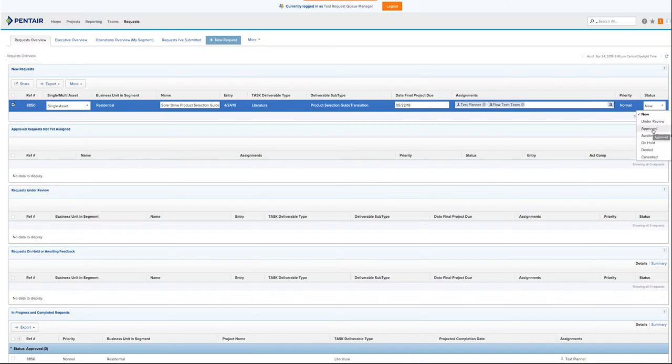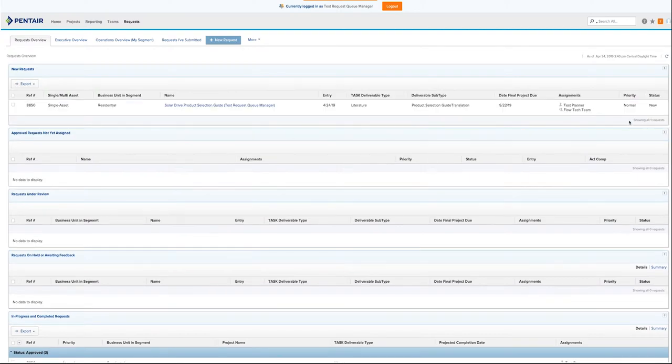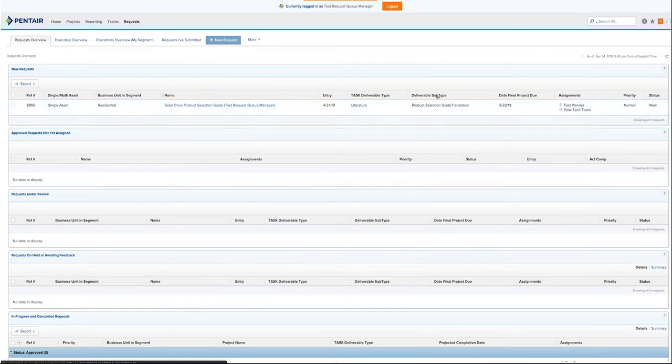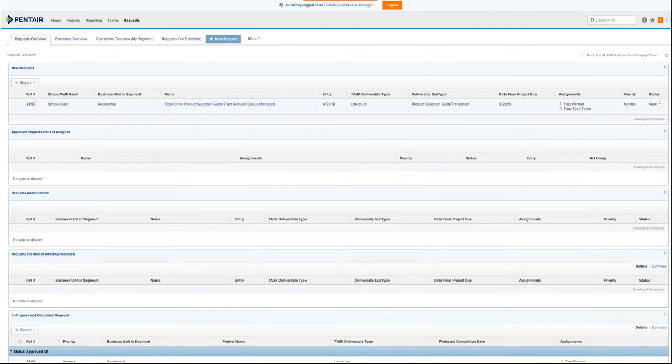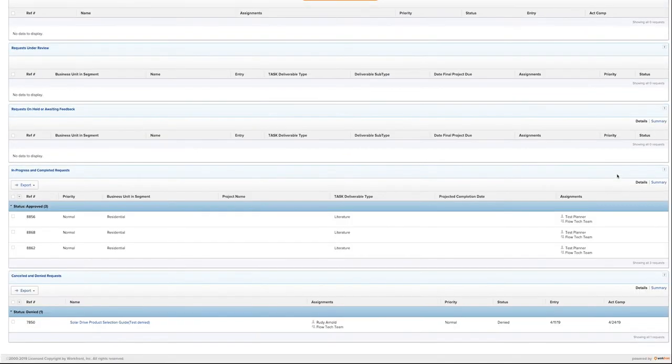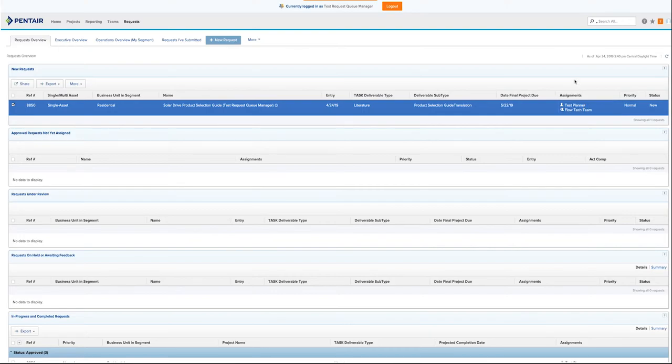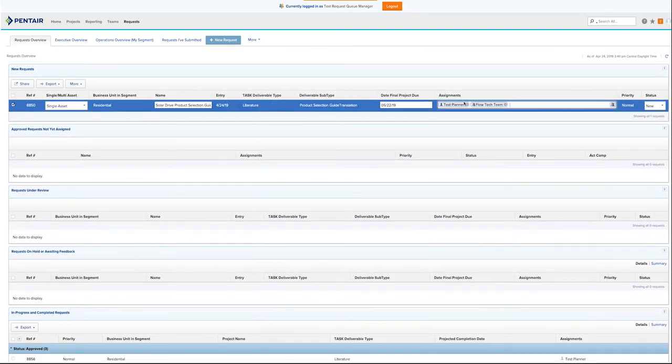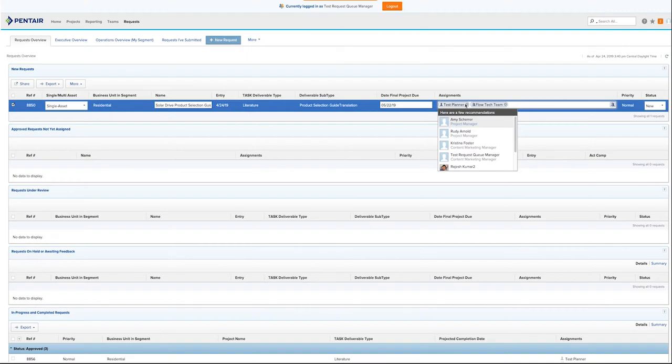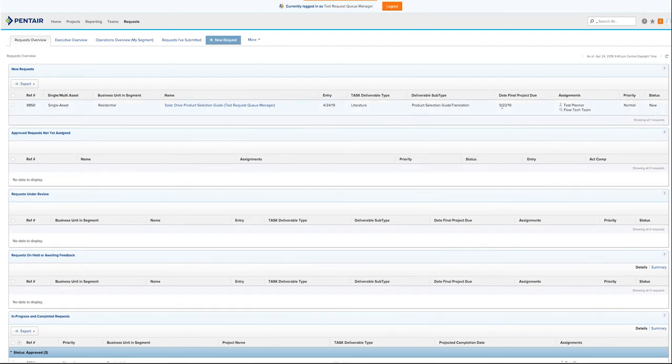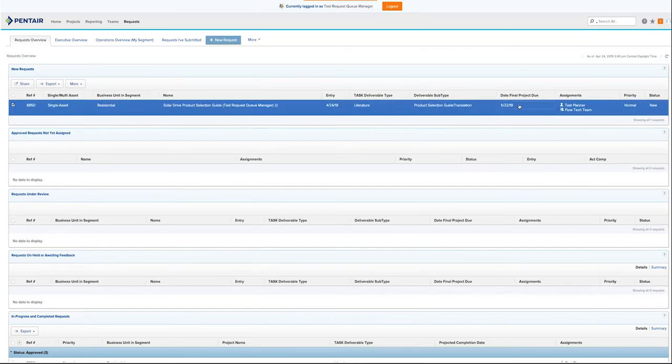But today we are going to approve our project. Now, we are going to leave this project as new for the sake of our training, but if you were to click approved, it would be assigned to certain individuals. You need to make sure that it is assigned to the correct team as well as the correct planner. And in this case, for flow technologies, the planner would be Rudy or me. However, in other segments, that could be yourself or another individual. Make sure to put that here. You can also change the final due date.